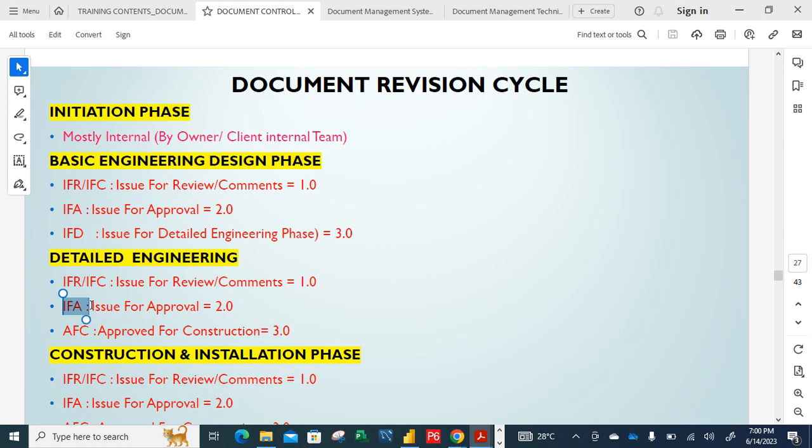This is the second stage. If you are issuing a document for approval, that's two. Some companies will say B. Some company will say A can be just one, A point zero, and some will just say B point zero. If you see that B, it also means IFA. The company's issue for construction is C, but some companies prefer numbers. So that's just how it is. Once it goes out at this stage, IFA, which is two,